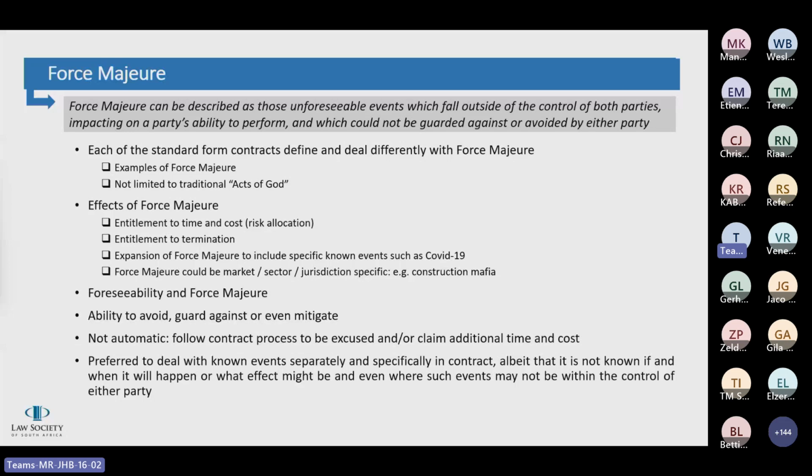In Ramdale Cape versus South African National Roads Agency, the court found, however, that these disruptions were not a force majeure as defined under a FIDIC Red Book, because they were not completely outside of both parties' control. The court found that they could make an additional payment to avoid the risk.